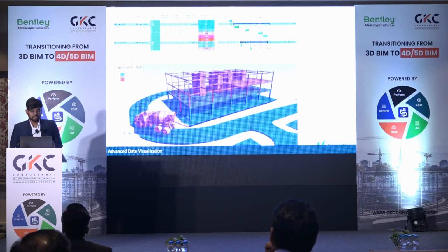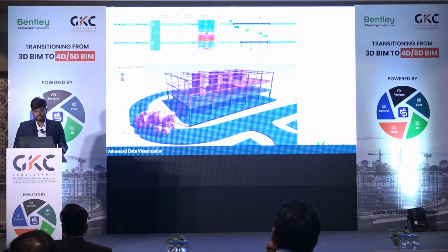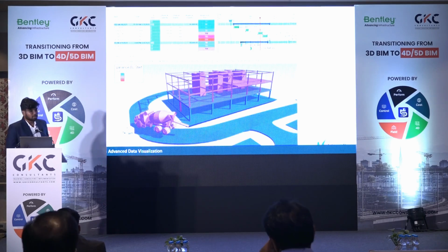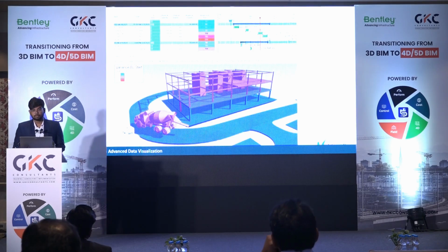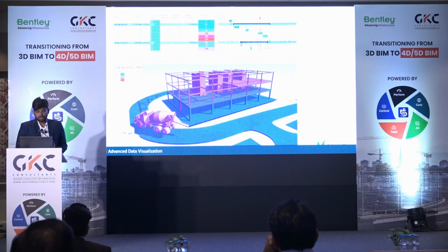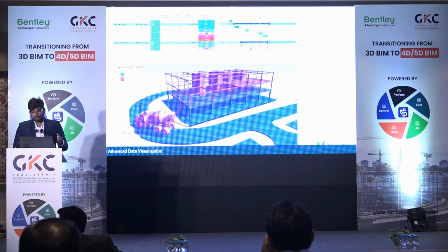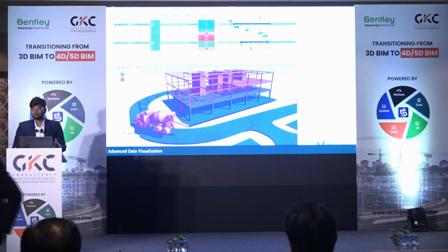Now you can start questioning why we get a delay when we start constructing the steel, whether there is a delay in arrival of the steel elements, or why there is one particular column which is in red. So why is there a delay in that particular column, what's the history involved with that column? You start questioning better, and even if you do not have the answer, maybe after knowing what issue you got, next time you can take a better decision, modify your plan, or modify your 3D model, or talk with your contractor to prevent that.